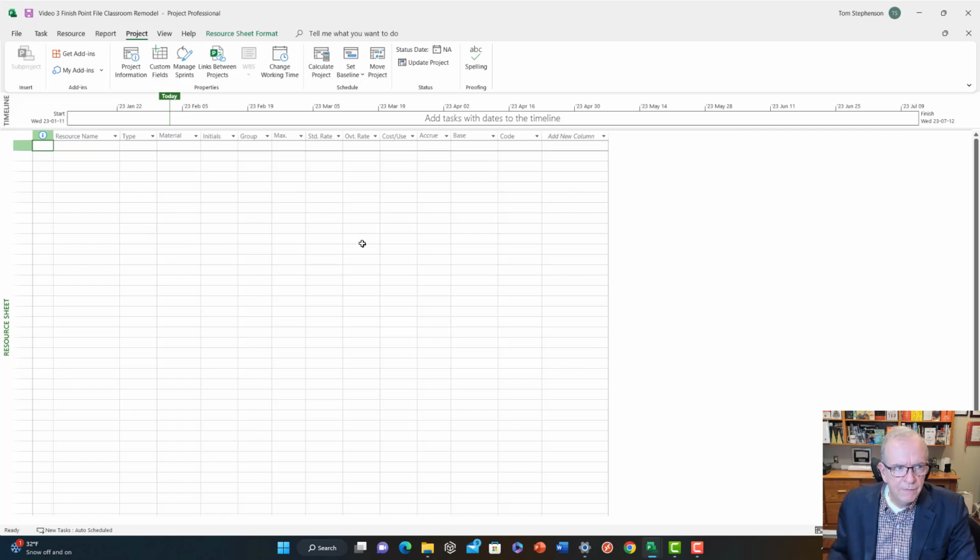So this is a very, very important table that we actually populate. Now, you might not add costs if you're not doing a cost-loaded schedule. You might just want to add resources, but you still want to add resources and assign them so you know who's responsible for which activity. So this is where you would put people's names or trade partners' names, companies' names, vendors' names, that sort of thing. So you could assign them and then hold accountabilities.